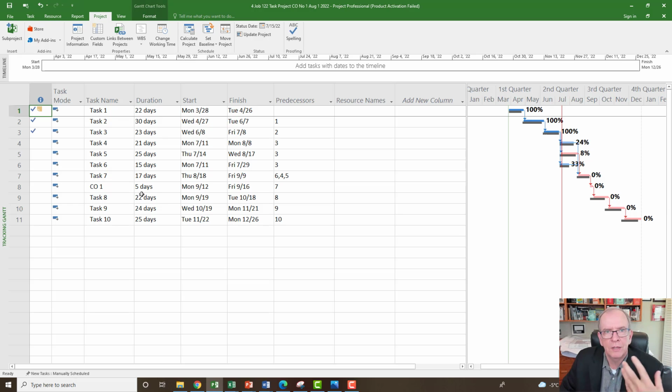So that's going to affect the cost of the change. Perhaps we can't even get the time back because now it's just going to delay the project, and it's gotten to that impossible zone where it doesn't matter what we do. So these are questions, but if you never put a change into your schedule and you never check the impacts, how do you know? This helps you, because I'm doing this in a very simple example. It gets much more complex than this in the real world.